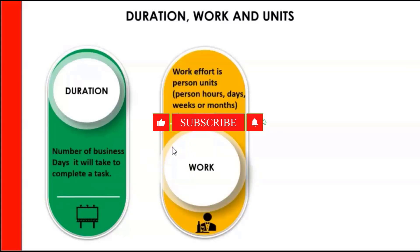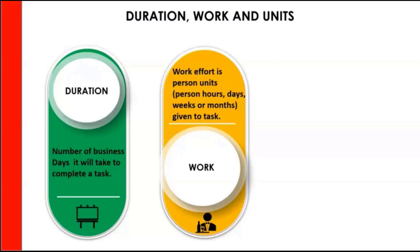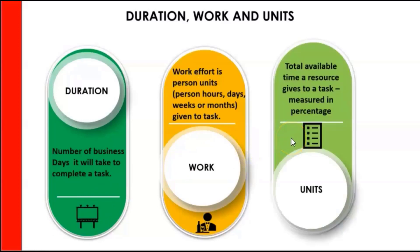So let's look at work effort. It's the person units — person hours, days, or weeks entered for a task. So the task is two days, but you have three people working on it. Each person will work eight hours each day, so you're going to have business days where each day is eight hours. Think of the work effort as your cost — you are going to have to pay 48 hours of work. Units is the total available time a resource gives and is measured in percentage. When we fill out our resource sheet, we put some people at 100%, which means they're working eight hours, and some at 50%, meaning they're available for four hours.